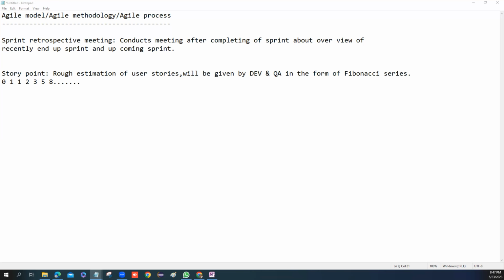What they do basically, every other week on Monday, is set up a meeting with developers, QA, BAs, and the product owner or the Scrum Master. They all sit together and decide, for this particular sprint, how many product backlog items we are going to work on. They decide, okay, 5 product backlog items, and they explain what the features are.